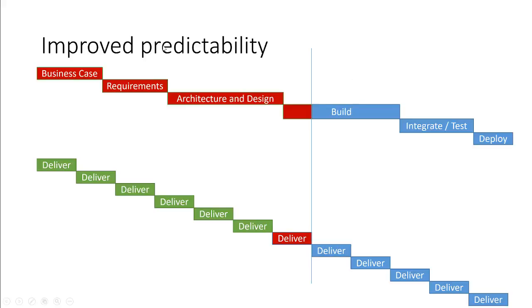We actually were thrown way back to the requirements. We didn't have to go all the way to the business case, but back to the requirements stage, which means none of this work was actually worth anything. We had to throw it all away. The requirements work, the architecture and design work, and a quarter or a third of the build was gone.